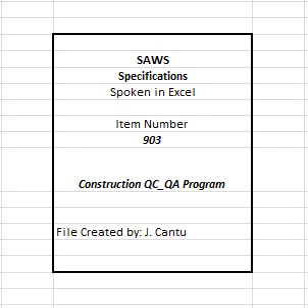2. Contractor responsibilities. As stated previously, QC is the contractor's sole responsibility. This includes, but is not limited to, the following. A. Providing the quality specified in the contract documents. B. Implementing and maintaining an effective QC system. C. Performance of all control activities and tests. D. Completion of acceptable documentation of QC activities.